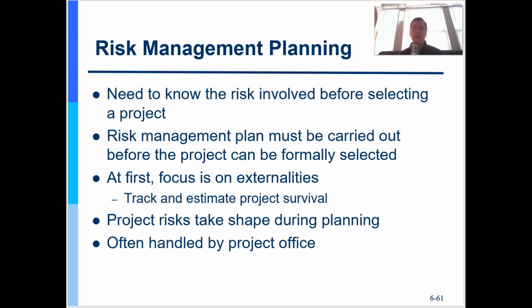And so first we want to start out by doing risk management planning, right? We need to define the constraints on those processes you saw on the last slide, or they refer to them as sub-processes, right? We need to define those. We need to define the metrics, the limits. We talked about qualitative and quantitative standards. Well, what are those ranges that we want to apply? Does the company have something they can offer that they expect us to use in this project?